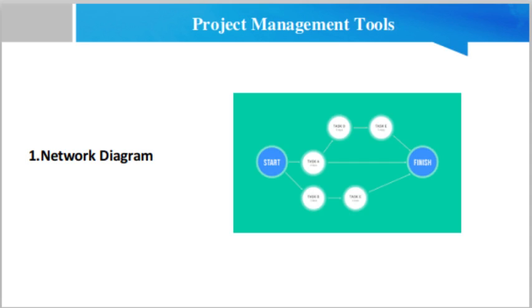In the process of forming the network diagram, there are always some assumptions to be made. The first assumption is that all pending or ongoing activities have been completed before starting new ones. The second assumption is that all the arrows used in the network diagram indicate a logical priority. What that means is that the direction of the arrow displays the unique sequence that needs to be followed for the proper execution of activities.